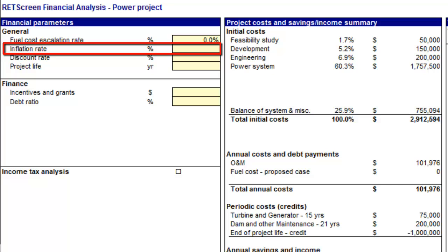It is very difficult to predict the long-term inflation rate for any country. Even armies of financial analysts at central banks cannot predict accurately more than a few months or a year ahead. Many factors come into play, including national and international political, economic, and weather events. Assuming fairly stable conditions and based on a simple extrapolation of recent trends, we'll assume inflation to stay in the 3% range. But it is possible that inflation could become null or negative, or return to the high values of the 1970s and 1980s and average 6 to 9% over 20 years. A negative inflation is called deflation.